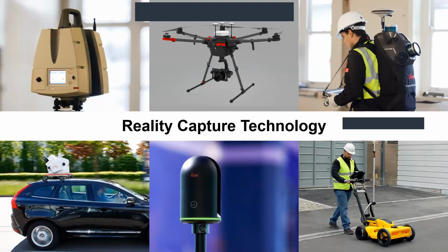So we implemented a few solutions like GPRs, the DS2000. Those are ground penetrating radars with multi sensor antennas, so that you can understand what is below the ground. Before digging on a construction site, you should be sure that you are not hitting any utility which might cause problems later, so that you can have a reality on ground analysis: what is above the ground, what is below the ground, and how they meet.